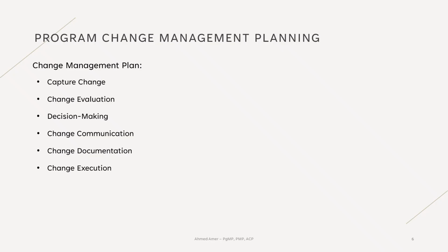A big part of the change management plan is understanding how to evaluate the impact of change. The change may trigger changes in the organization or governance structure. For example, do we require a new program sponsor or a shift in the program steering committee? Costs. Maybe a component or a major activity suddenly requires more funding or resources generally.